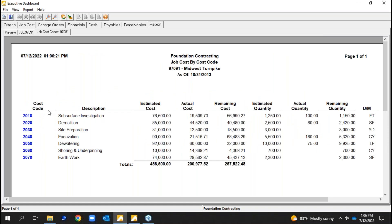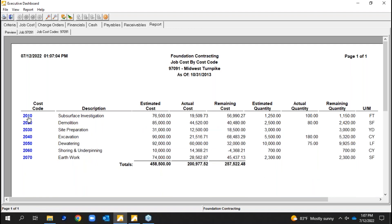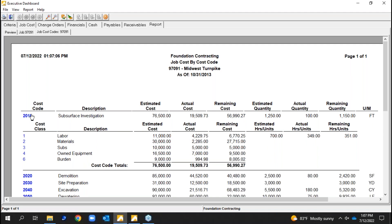We do a really good job managing commitments, so purchase orders and subcontracts issued for a job show total committed values. The system will stop or alert you if you're overbilled on a commitment. This job is roughly $200,000. Getting into the detail, these cost codes here are just samples — this is some type of highway job with demolition, excavating, civil work. A lot of our clients use cost codes, whether it's framing, underground utility, drywall, or whatever the activities are.